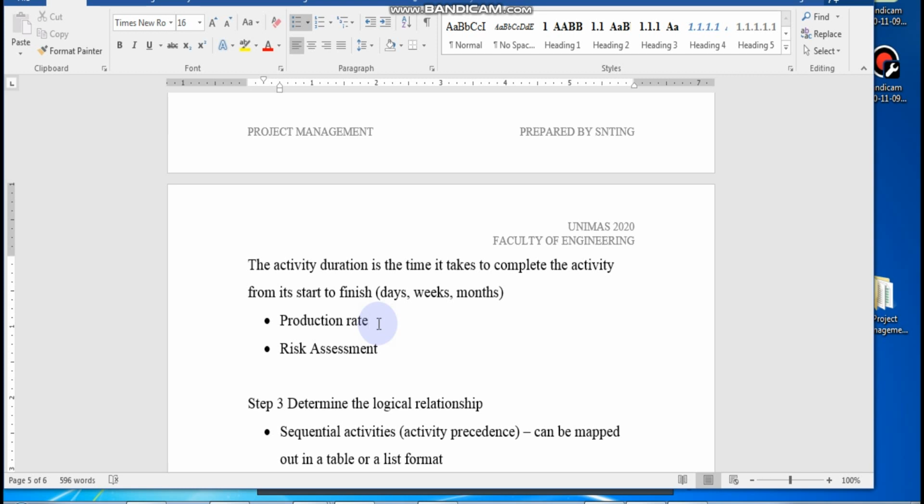So if I say that my power machine can do 10 pounds a day with this particular soil condition, all factored in already, that's about 10 pounds a day. So if I have about 1,000 pounds to do, that means I need 100 days. Do you know the calculation? Can you see the calculation? Are you clear about the calculation? Okay, so basically 10 pounds per day, quantity is 1,000.